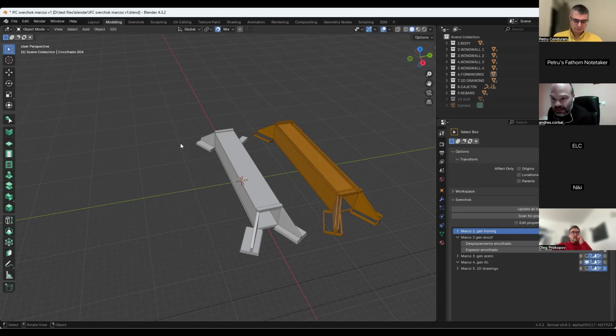Not calculate, but manage the rebars, the assembly part. I have to buy, in my current building city, 7 million kilos of rebars. It's a lot of hours reviewing all the lists of bars. And the measurements, the same, the formwork and the concrete. Every month, you have to close the month with the units you build, and you have to measure them again and again, one month, the next month a little bit more.